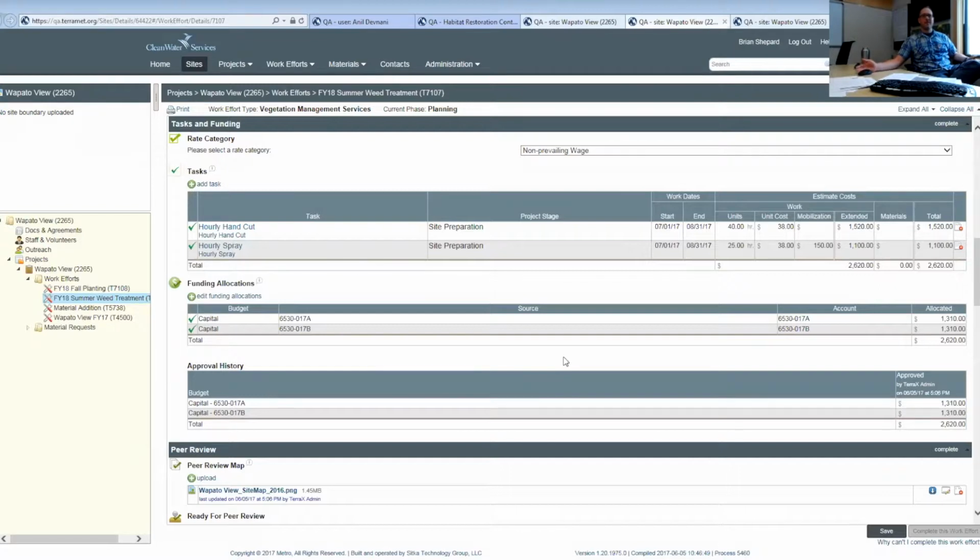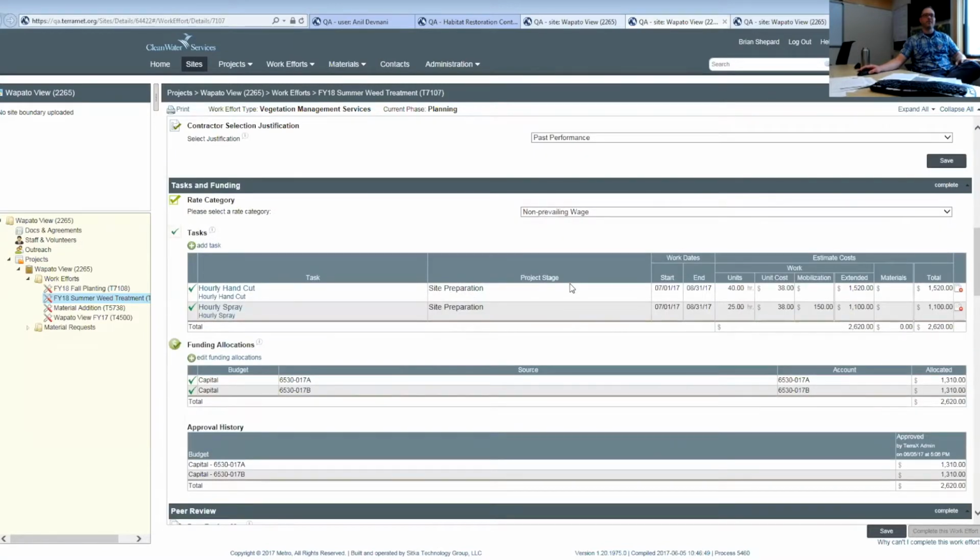Just to give you a sense of scale, we typically cut several hundred work efforts in a fiscal year. And this process has dropped the amount of time from creating them to getting signatures from probably a couple weeks to a couple days. In going through this, we've also adopted some internal processes that are helpful, mostly in using DigiSign to electronically send these prepared contracts to our contractors for signature, instead of having to mail multiple copies and having them returned and putting the paper copies into a folder and scanning the rest so that the project managers have them.